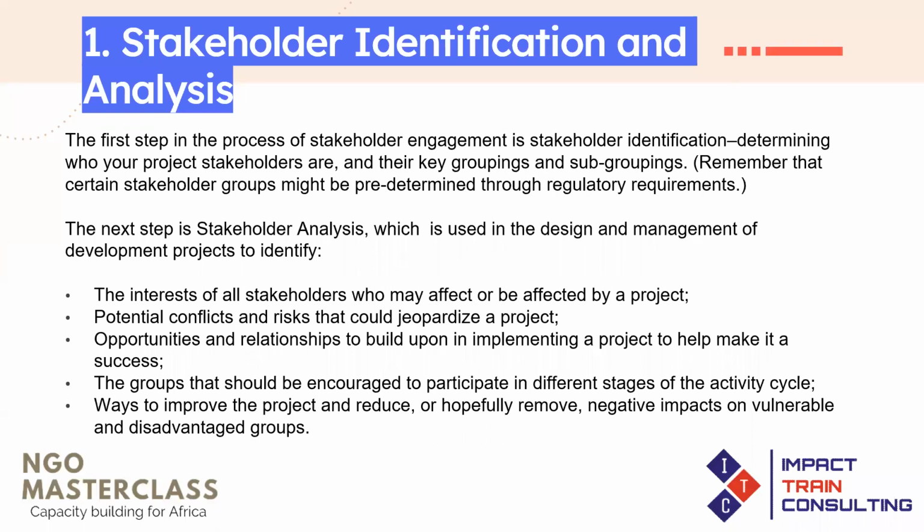But after the project has been designed and you want to start it, there are going to be stakeholders that you need to first of all identify. And so it's very important that you identify all your stakeholders by listing them. Who are the people who have some level of interest in the things that we're doing? Who are the people who are affected by our project activities or by the problems that we're trying to solve? Who are the people who are causing the problems we're trying to solve, and so on? So stakeholder identification is very, very critical. And once you've done your stakeholder identification, the next thing that you want to do is the stakeholder analysis.